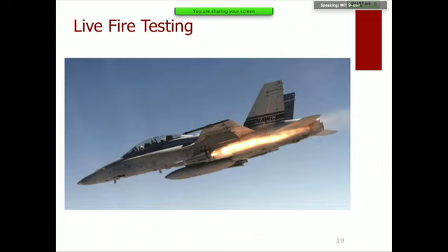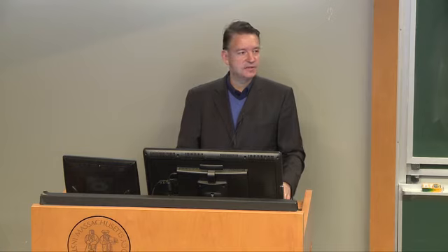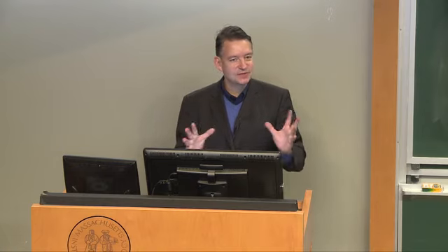So if you want to do a live fire test campaign, you have to reserve the range at least 18 months to 2 years ahead of time, because a lot of other services, a lot of other programs are using the same facilities. In Europe, it's a little harder, definitely in Switzerland, because the country is so small and